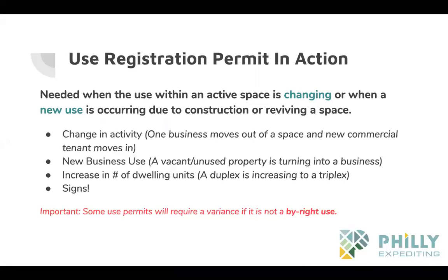And then signs actually need zoning use permits. And then, of course, some use permits will require a variance. Some zoning permits require a variance. Some use permits require a variance if it's not within the boundaries of the zoning code. So we do that.